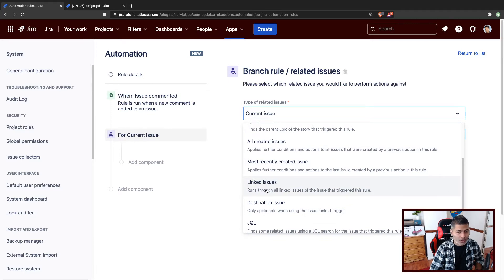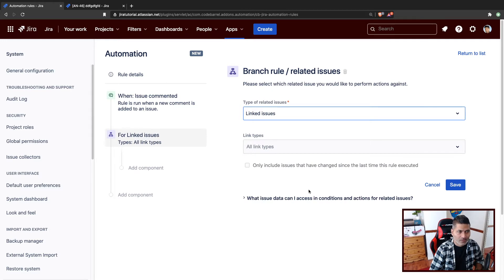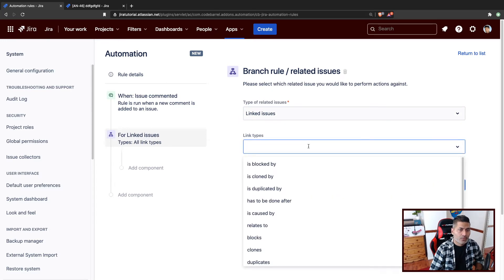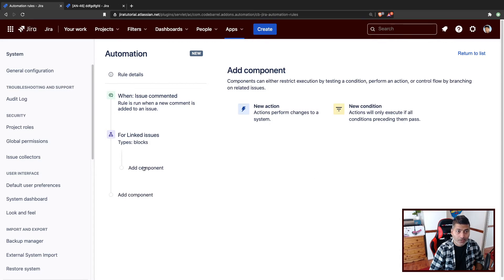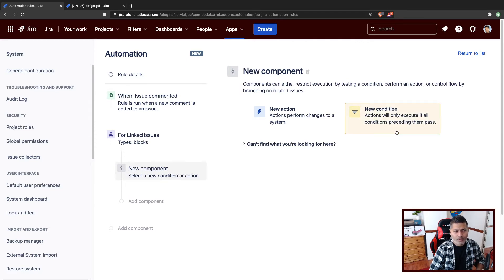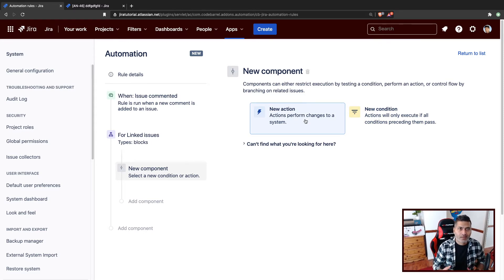We can use linked issues — or JQL — but linked issues is fine for this example. We also want to select the link type; I only want to do this for issues using the link type 'blocks'. Now, within that branch, we are talking about linked issues of type 'block' and we want to add a comment on those linked issues — essentially syncing comments one way.